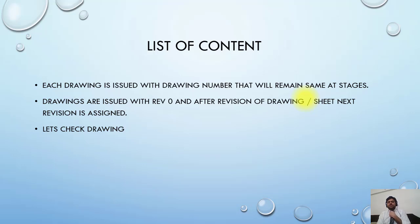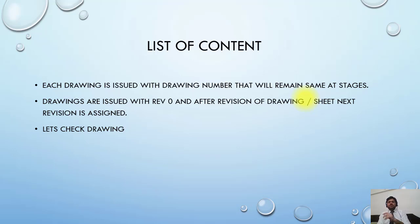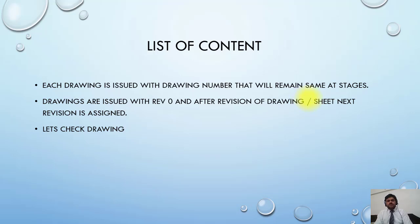Drawings are used with revisions starting from zero. There are two ways to handle revision numbering: one way is that if one sheet is changed in a new revision, you can change the revision number of the complete drawing. The better way is to change the revision number of only that drawing sheet where the change occurred. Both practices are used.